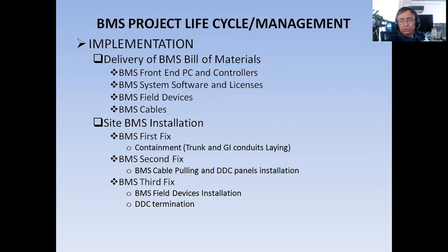Now make sure that you do not bring any materials to the site which are not approved by the consultants. Everything should be approved by the consultants, so you will not encounter any problem later on. So after delivery of the BMS bill of materials, then site BMS installation. This site BMS installation depends on whether this scope is part of the solution provider or the scope of the MEP company. Anyway, if it is the scope of the MEP company, then they will do the BMS